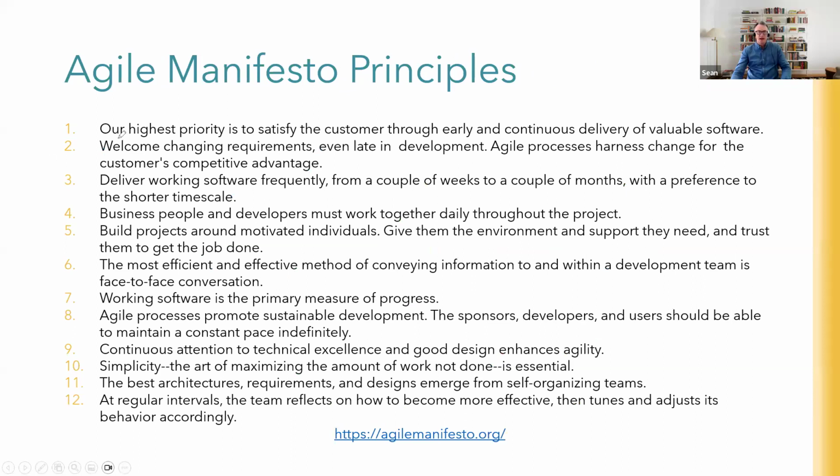The first one is, our highest priority is to satisfy the customer through early and continuous delivery of valuable software. So it's not just working for months, then delivering the product. It's breaking it down into iterations and increments and delivering them to the customer all the time. So is this what you wanted? Is this the value you wanted? These requirements, they're being met. So it's breaking it down rather than delivering something big at the end.